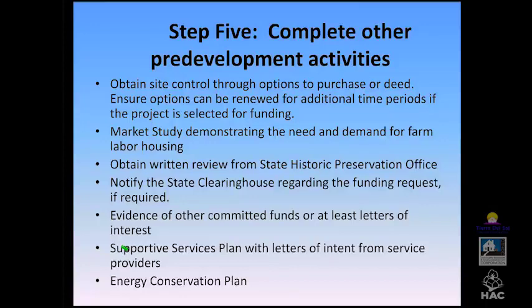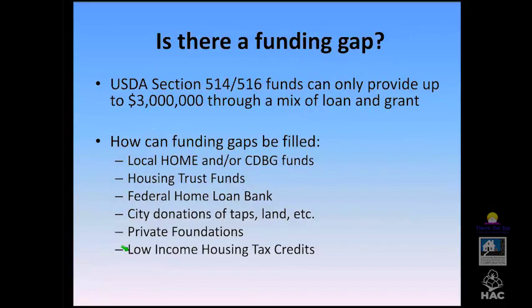I also want to say something about the funding gap. The sponsor is required to put in at least 10% of their own funds into the project. So that can come in the form of donated land, market study, upfront development costs, other sources that you have identified.